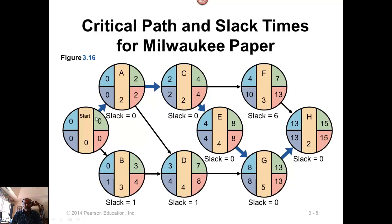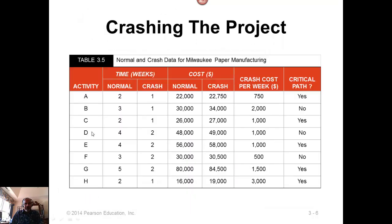In our example, the critical path is A, C, E, G, H. Looking at the table, of those critical activities, A has the smallest crash cost — not F, because F is not a critical activity. You can crash A, and the amount of crashing allowed is one week. Repeat this process until the desired completion time is achieved.